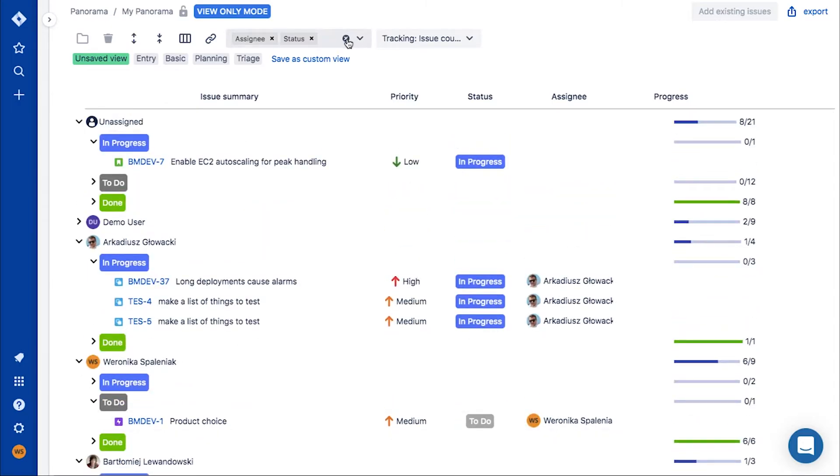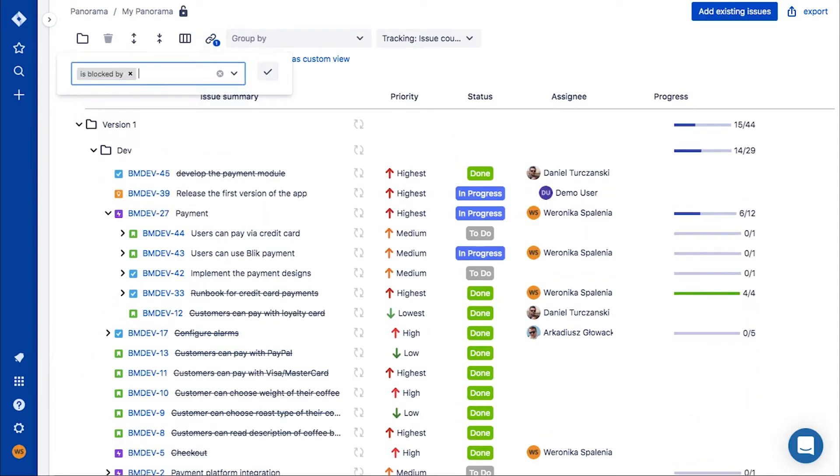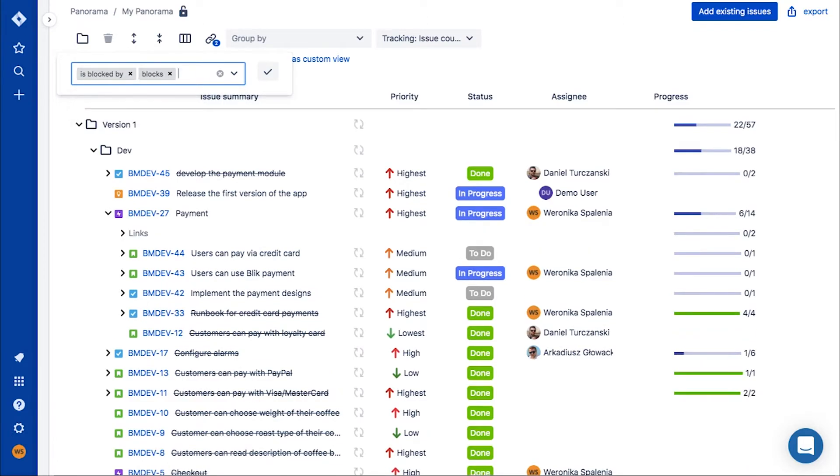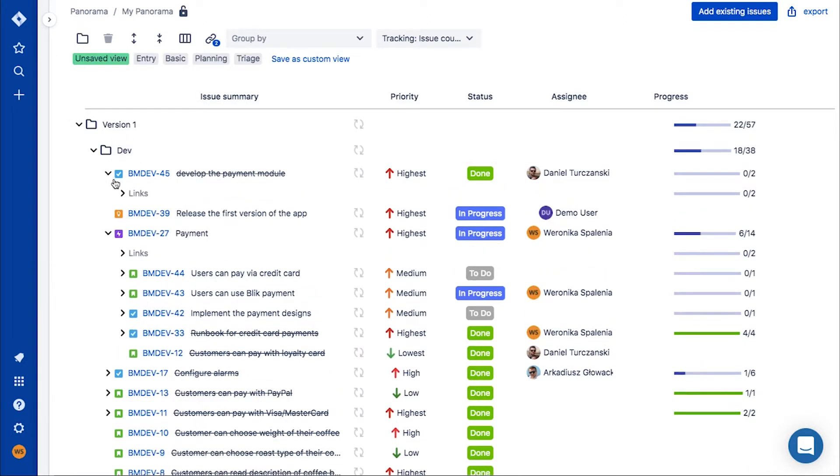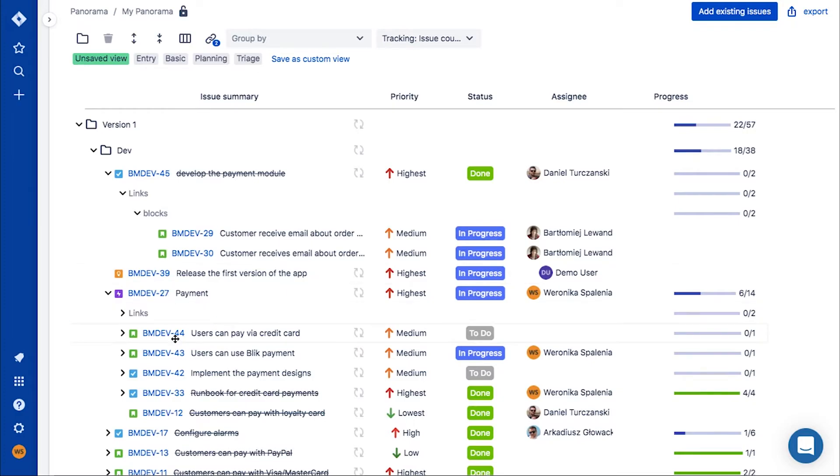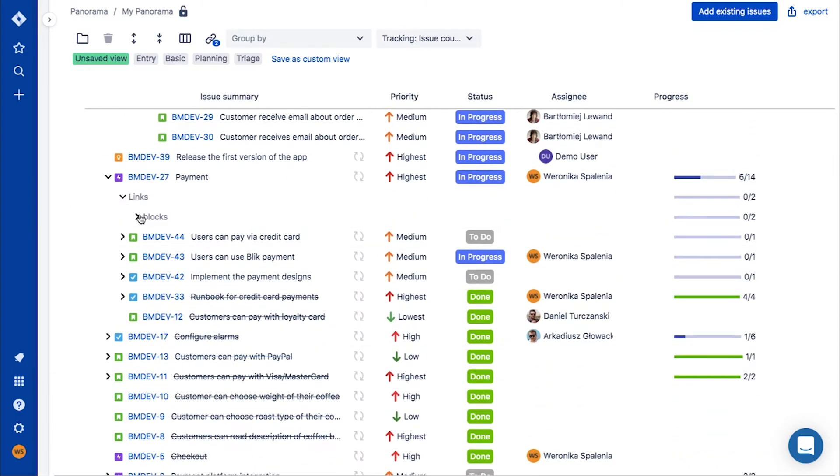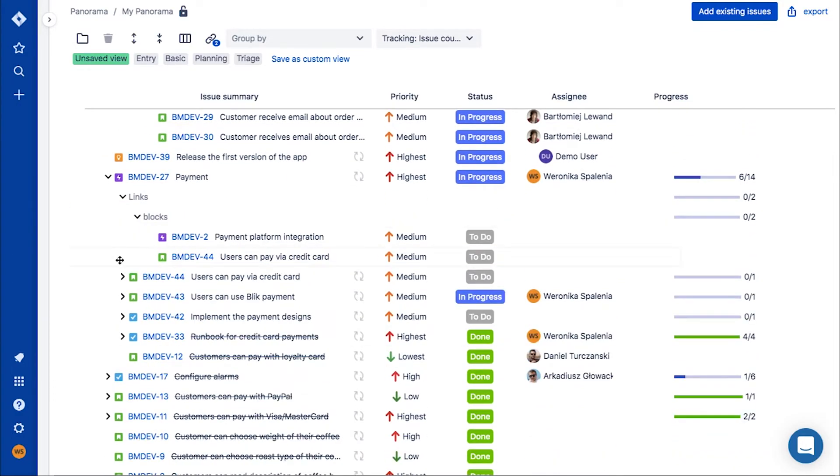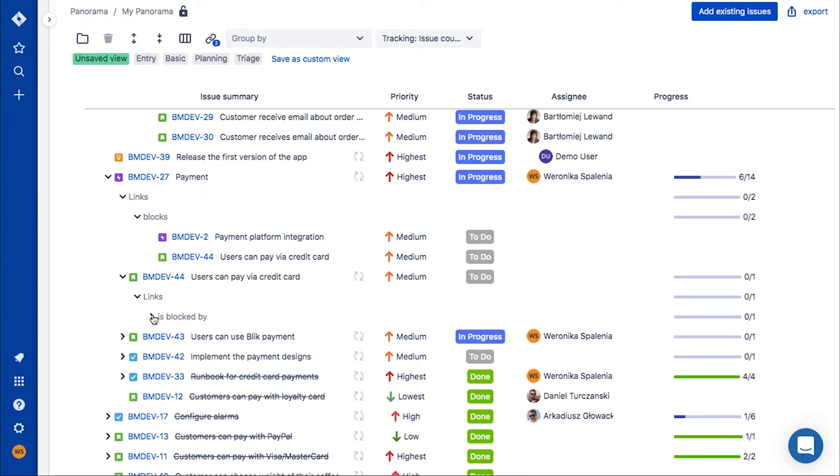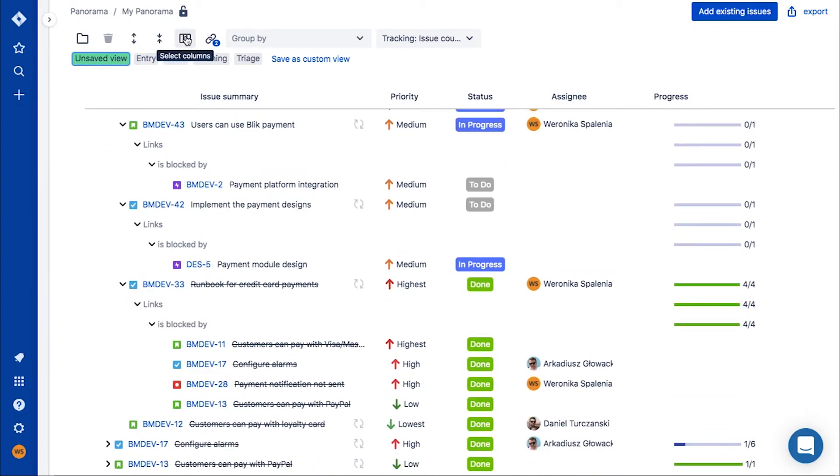We have also created a linking feature that allows you to see links connected to each issue. If you want to check what delays the issues with the status of to-do, you can add isBlockedBy in links and status in the grouping, and you'll have your answer.